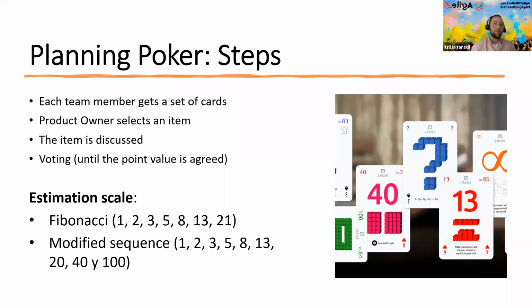Yes, in fact, if you have a small team, you would usually use a scale from 1 to 8, and rarely up to 13 and 21, etc. We will see further in the presentation when we could use those. Sometimes you need to break down an item which represents 8 points because it's too complex to be completed during the sprint.